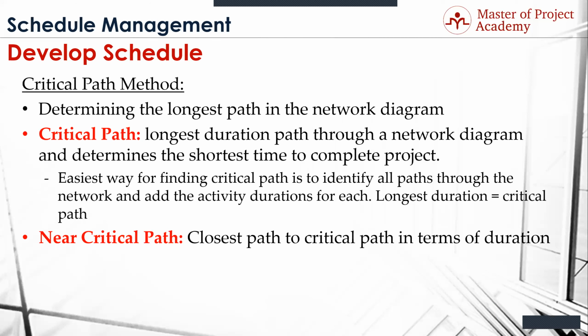What you're doing is you're identifying paths in your network diagram that you need to pay attention to as a project manager. Because that is the key question that you need to ask every person that comes to you and says, I'm late on this particular deliverable, or we're going to have problems with this one because the resources aren't going to show up. Your first question should be, is it on the critical path? And maybe the second one is, is it on the near critical path? And if the answer to that is, I have no idea, then you haven't educated your folks very well. They need to know if they're working on something that's on the critical path.